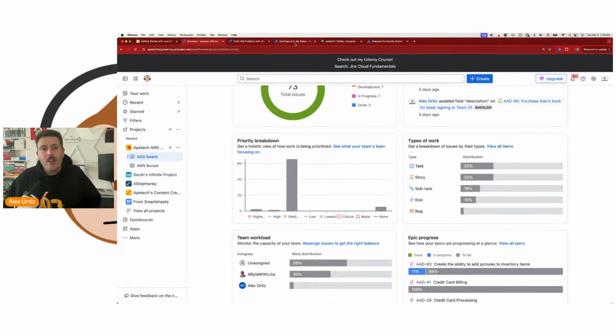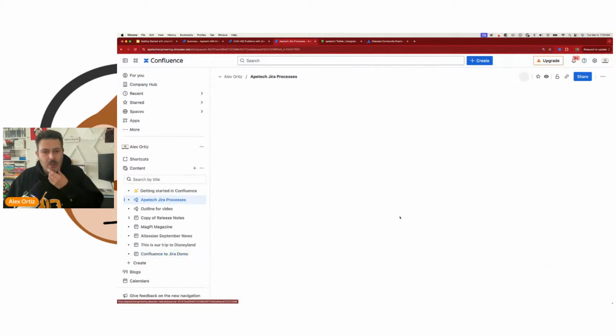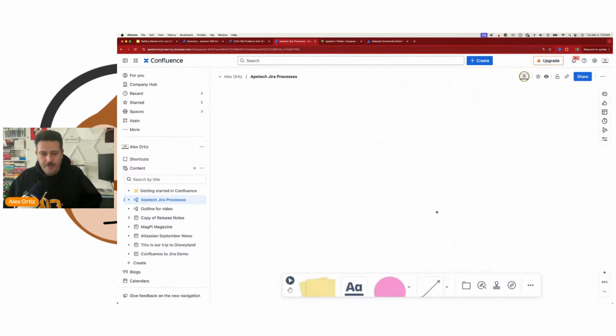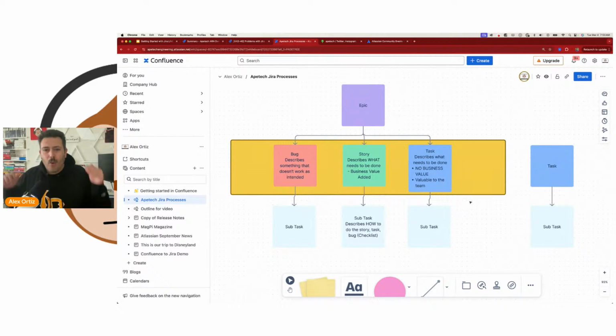And I would even go as far as saying, take this picture here that we were working on, right? What you want to do here is, for whatever issue types you do decide to go with, have a clear definition. Everybody in your team should know exactly when to create a bug, when to create an epic, when to create a story, when to create a task, when to create a subtask. And you want to have a very solid understanding of this. This is very crucial for your team to be able to communicate effectively. So have good definitions. And then if you don't need something, if you don't need the story, right?